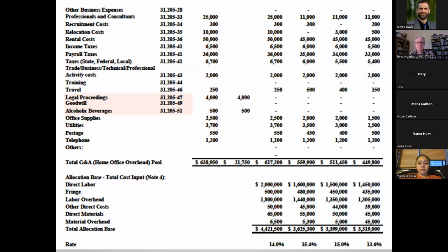Profit also covers inflation, which is a terrible situation right now for a lot of contractors. If you bid something firm fixed price, meaning I put my cost out there, my price out there, and I bid it, and now I'm into the project for 2 years, and the inflation and the labor rates are just outrageous, if it's firm fixed price, that's going to come right out of your profit. If you don't understand these basic concepts of how to set up these costs in certain categories, you can't make educated decisions about your business.